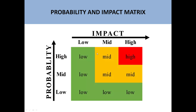If you look at the color combination in the matrix: the green cells indicate low priority risks that can be considered at a later stage. The yellow cells are important — they must have some risk response planning, meaning you must have a plan for how you would handle it if that risk occurs. The red cell is the most critical — it represents risks that, if they occur in the project, will have a catastrophic impact and could essentially destroy your project.